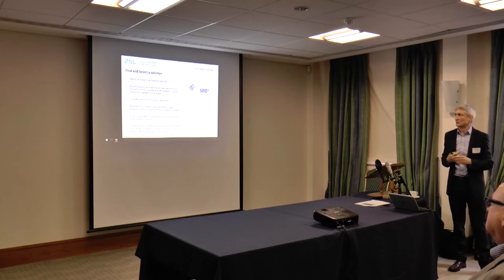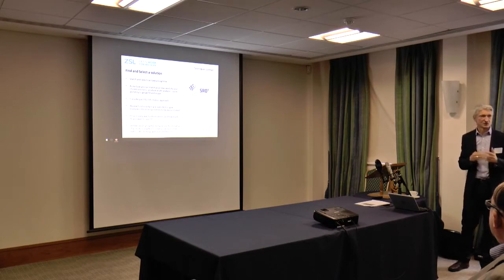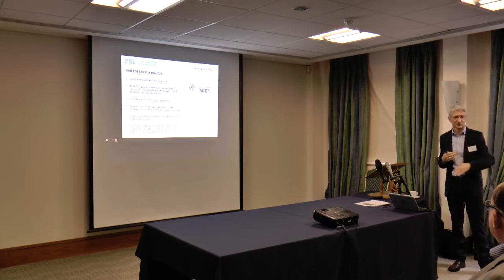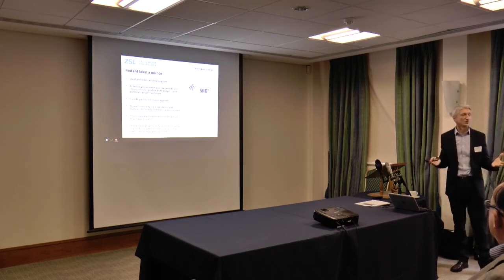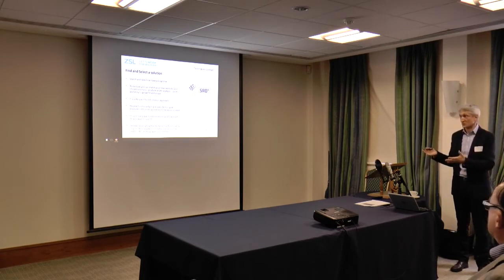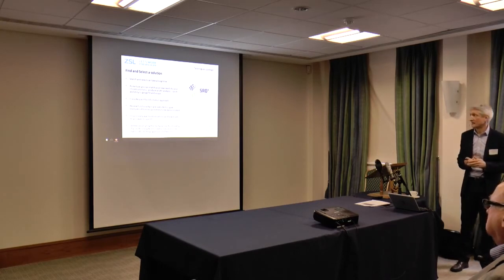Another tool that we didn't use but you could use is a request for information. Vendors prefer that at an early stage than a full RFP, in my experience. A full RFP of 20,000 line items they've got to tick isn't necessarily going to get their go. If you can give them what you want to do broadly with your processes, then they can come back to you with a more informed document. You may then want to go to an RFP situation, you probably will, but at least you're then getting the information you need to help you make the decision.